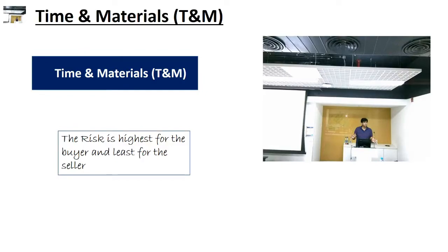The time and material contracts are used to bill customers for a standard labor rate per hour used plus the actual cost of material used. Now, the standard labor rate per hour being billed does not necessarily relate to the underlying cost of the labor. Instead, it may be based on the market rate for the services of someone having a certain skill set or the cost of labor plus a designated profit percentage.